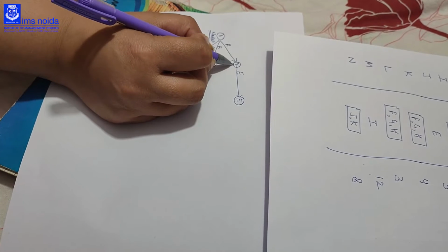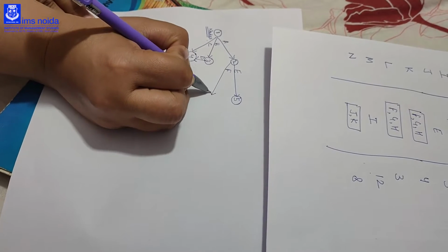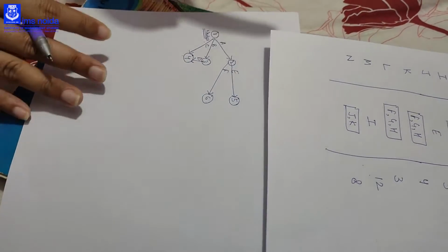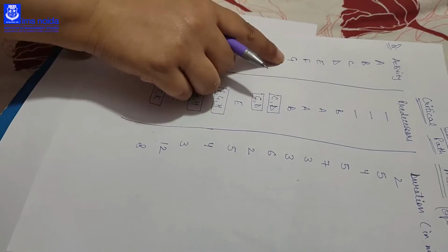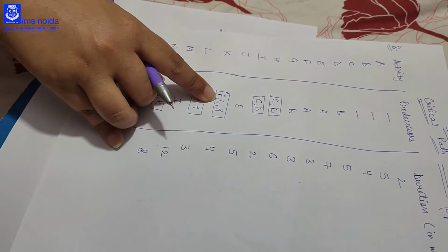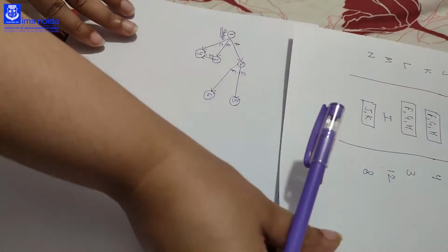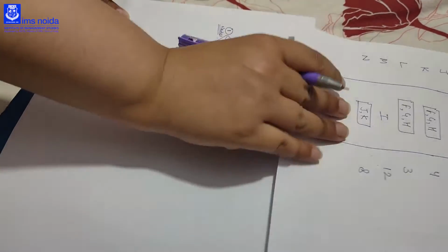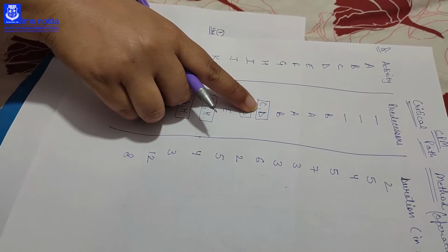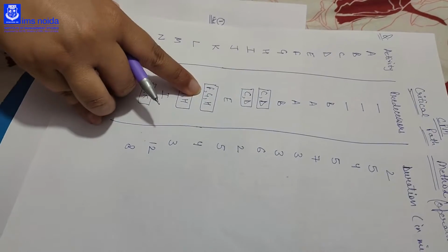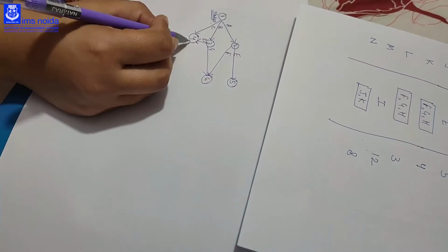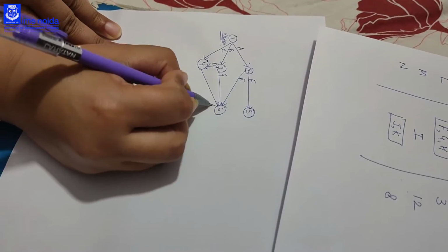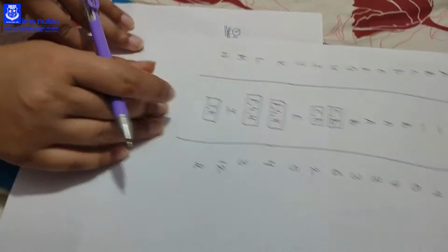So we will start F from the A node, make an arrow, and make a node of F, that is 6. Then you can see G starts with B and combines with F further in the question. So we will start G with the B node and combine it with the node of F. Then you can see H starts with the combined node of C and D, and further it combines with F and G. So we will start H from the node combining C and D, that is 4, and combine it with the node of F and G, that is node 6. So that is H. We have completed till H.